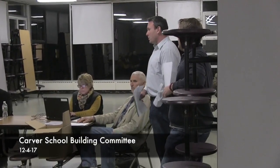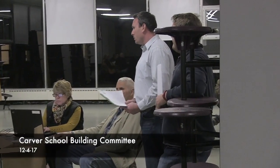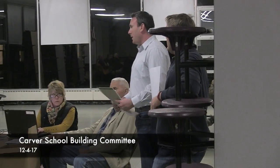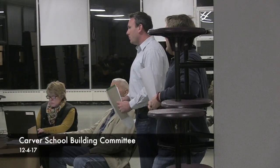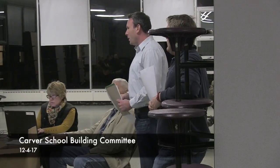Would you guys just elaborate on our contingencies? You just gave the percentages, but what does that really mean for the project as to what we anticipate spending, how much of our contingency we have built into the project? What's your best guess? So, as of right now, looking strictly at construction contingency utilization, the total spent and outstanding exposure for items that we think may have a cost coming down the road is $287,000. As Walter said, that is only about 15% of the total construction contingency, yet we are 60% through the project.